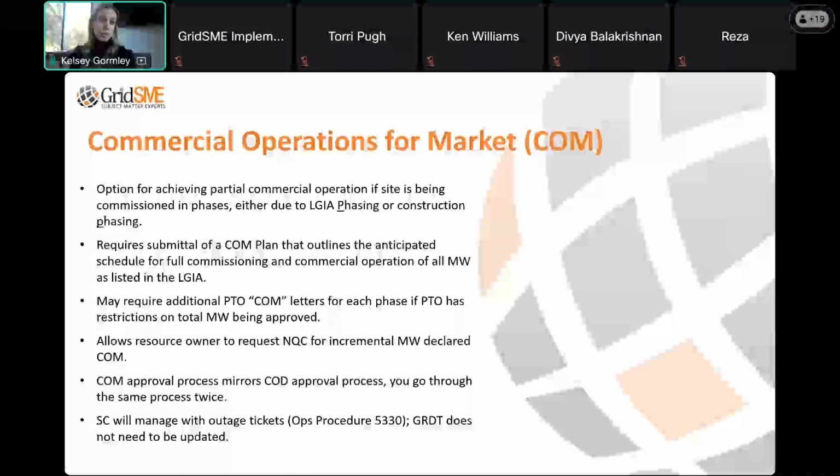I think you'd want to have full capacity, just so that you don't have to retest once the site is fully built out. That's why we always see folks doing it at the very end of a project or post CAISO COD, because they don't want to have to do it multiple times. They want to do it once when they have the resource fully built out and can hit all those targets. Got it. Okay. Thank you so much. I appreciate it. You're welcome.